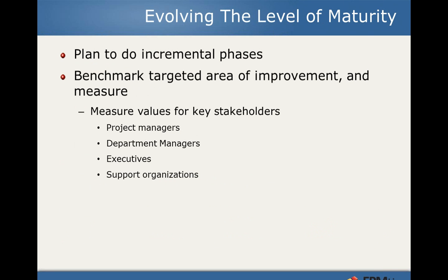If there's an area that you want to improve on, for example information communication and reporting, if we're spending an inordinate amount of manual time compiling reports and we know what that's costing us in people time and effort, now let's benchmark what it takes today, and let's set goals for what a system is going to do to save that time. Let's measure where we started, and after we put the process improvements in place, let's measure what we've got and the value of the time savings in that case. That's just one example.